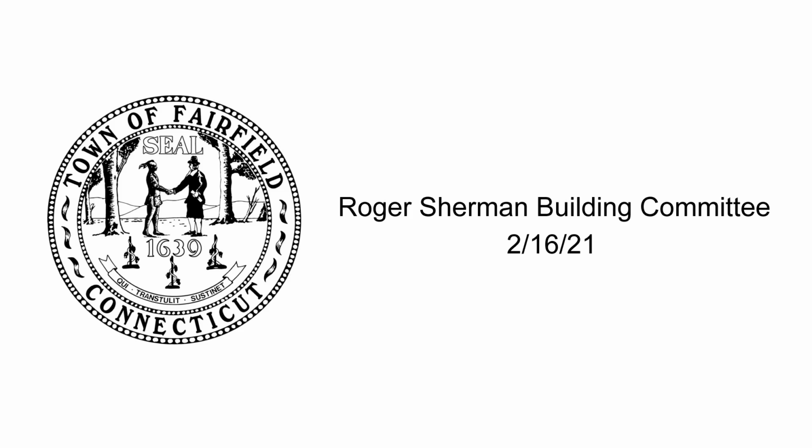Well, the first one's pretty simple. For August 31st, Diversity had requested that we get Fuss and O'Neill, the abatement monitor, on site for the glove bag of the pipes above the stage. We did so. Fuss and O'Neill showed up at 8 a.m. Diversity was not ready for them. Diversity told them to come back after lunch. Fuss and O'Neill went away and came back after lunch, and they still were not ready. So Fuss and O'Neill has a charge in here for $950, I believe, for the day spent where they could not do the abatement monitoring.